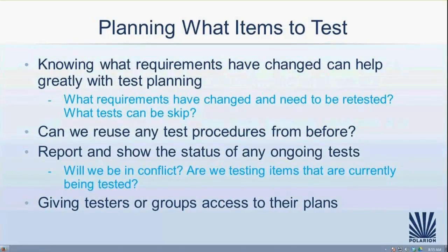First of all, knowing what requirements have changed can help greatly with test planning, simply because some requirements changes will need more testing than others, right? A change in the requirement at the very top level is probably going to propagate down to several test cases at the bottom. And it's probably likely that you'll have to execute all of those in order to ensure that one system requirement is being fulfilled. Whereas a slight change in the functional design may only need the re-execution of that specific test case. That's right. So it really depends on what your impact analysis is for the entire thing.